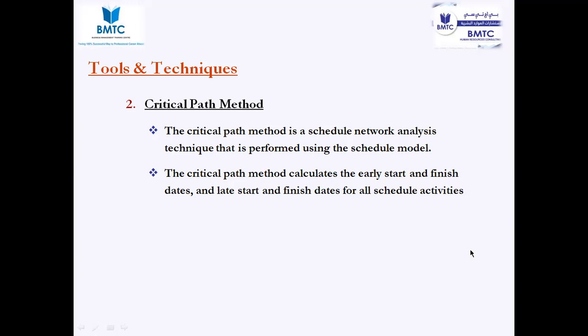Then it asks you to put your tasks in logical order, sequence them. Take the network diagram without time units. Call the resource department to estimate the resources, assign the resources, know their productivity. And apart from this, you ask your planners what time is needed to complete each and every task by the assigned resources. Right now, you've got your time units. So now you're able to accumulate all your time units to give the time scale for the entire project, when we need to start the work and when the project should be handed over. Is it clear, guys? One of the important techniques used by all the planning engineers is the critical path method.